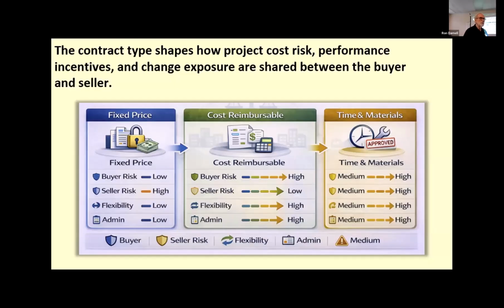So they can run the cost up and still get paid. So they get cost plus a percentage of cost. So those contracts require a lot more administration, a lot more governance than a fixed price does. Again, the procurement in the appendix there, they talk about contracts in terms of pricing, delivery, schedules, performance, and expectations, and supplier obligations.